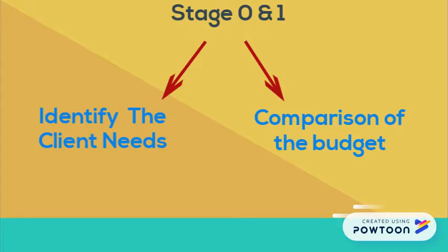Based on Stage 0, the focus is on the client needs and other core requirements. Other than that, based on Stage 1, the QS will start to prepare a budget for the client based on other similar previous projects.